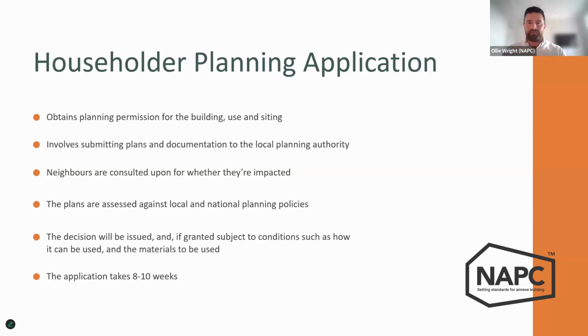So when Nigel comes to see you, he'll design out the building and take all your design wants and needs and your aspirations, and then he'll design your perfect dream annex. Once that's done and he's taken on board any sort of pre-application or that initial feasibility advice we've given him, he then formulates that. And once you've signed that off, we get this planning pack from IHUS. This is all your drawings, so it's elevations, floor plans, where it's going to go on site. We will then start to assess those drawings, and we'll produce a planning statement.